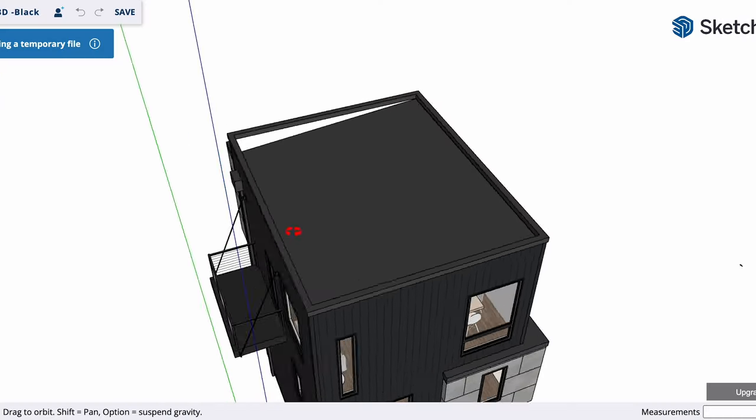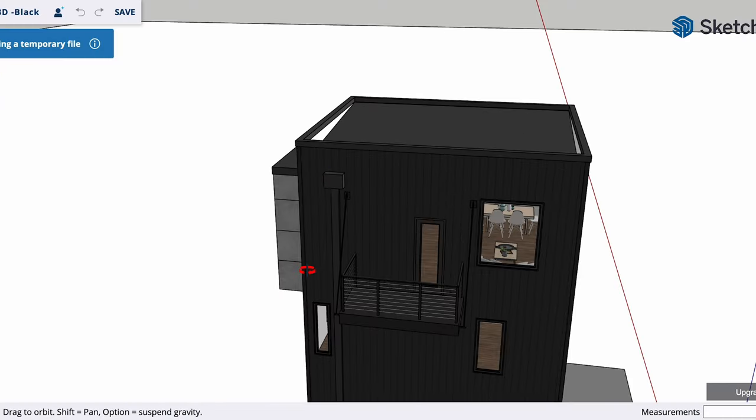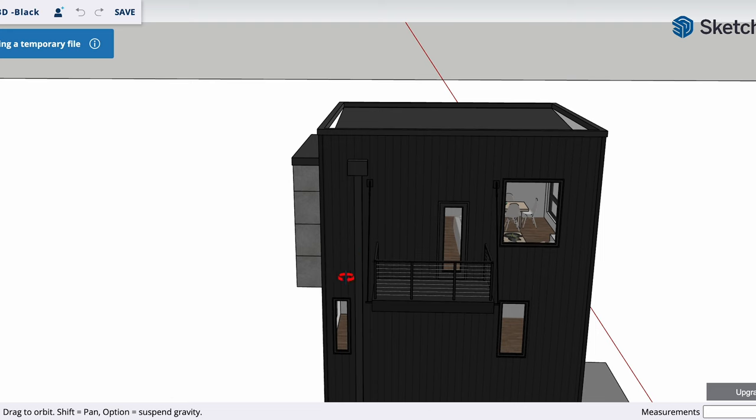For the roof we're budgeting $12,000. We're doing a flat commercial-style roof — not truly flat, it's about a one-over-twelve pitch draining to a box drain on the north wall. The material is TPO, which is used on a lot of commercial flat-top buildings. One benefit is we don't have the expense of a steel roof like you'd need on an A-frame.